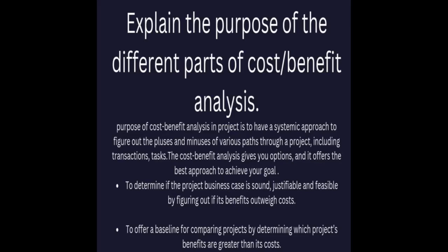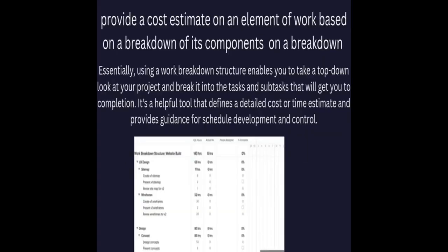The cost benefit analysis gives you options and it offers the best approach to achieve your goal. It determines if the project business case is sound, justifiable, and viable by figuring out if its benefits outweigh the cost. It also offers a baseline for comparing projects by determining which project's benefits are greater than its costs.